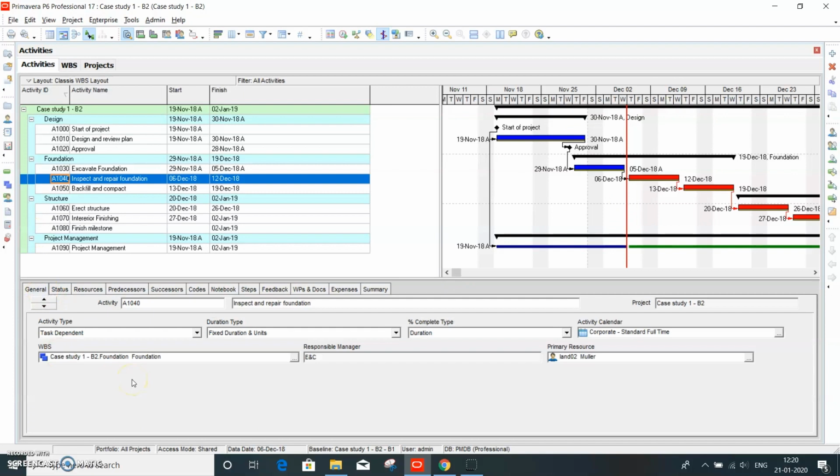So it's a kind of automated tool wherein, after baselining the project and once you get into the actual execution of the project, you can keep updating the status, so that it will give you what is consumed. You can even find out what the schedule variance is, and if there is any cost variance. So those details can also be tracked.